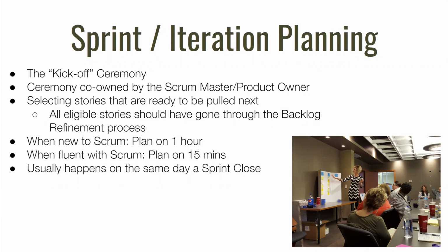When a new Scrum team is put together and you're new to Scrum, plan on at least an hour for this on the first couple times around, maybe your first couple sprints. But as you get better with this, as you get more comfortable with it and more fluent with Scrum itself and the flow, this should take no more than 15 minutes. I have teams that I've worked with where sprint planning takes 5 minutes, no more than that.